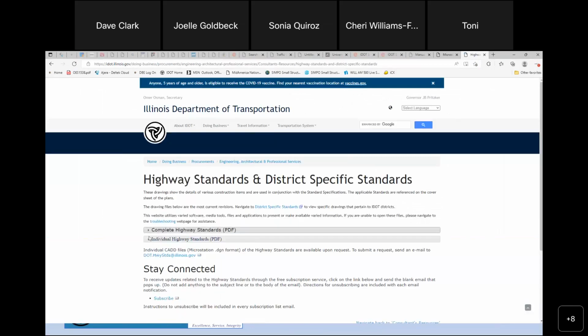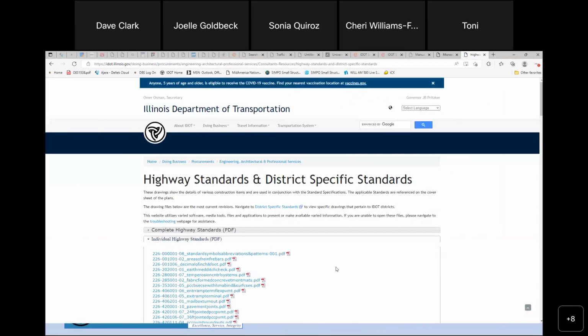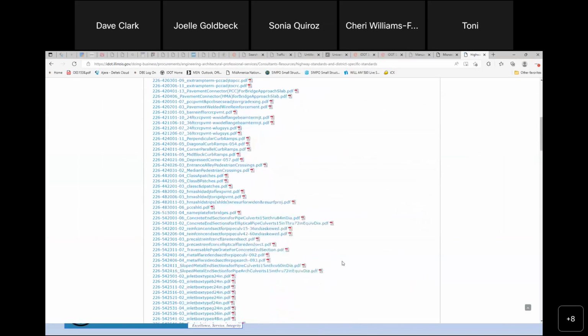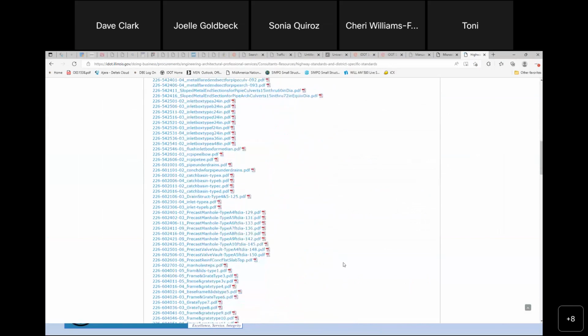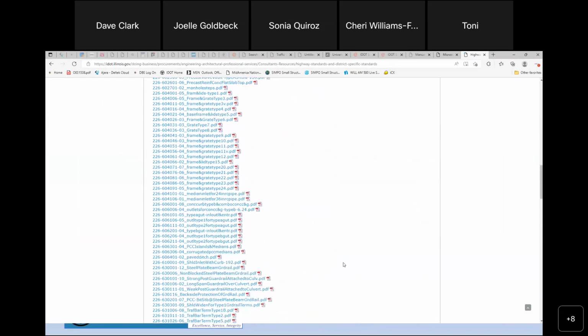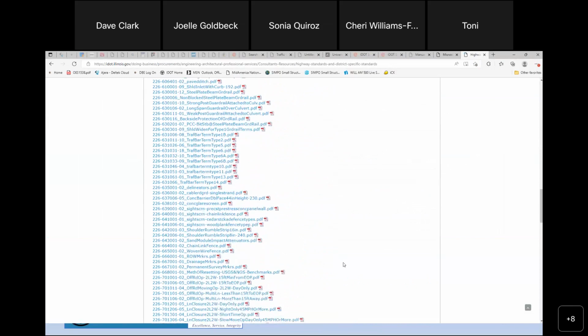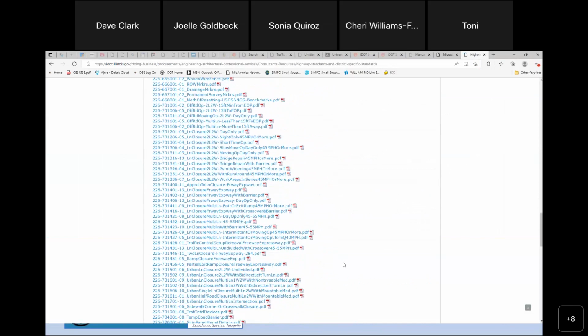And we'll go back to that again here. One other one I want to show you, and we'll talk about this next week in our workshop as we continue to expand on these kinds of items, is traffic control. Traffic control is a 701 number. So here again, you can see anything that's got a 701 is going to be something that's traffic control.